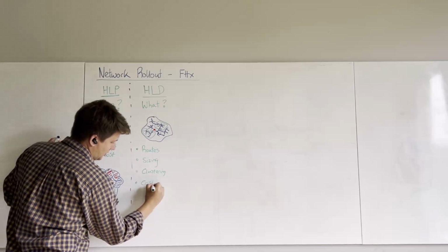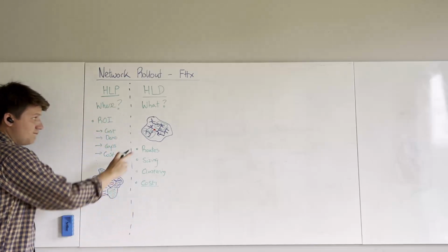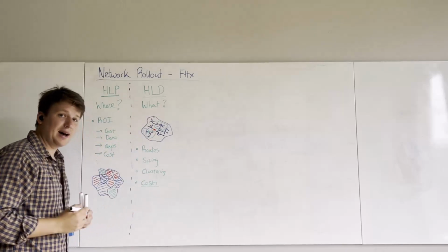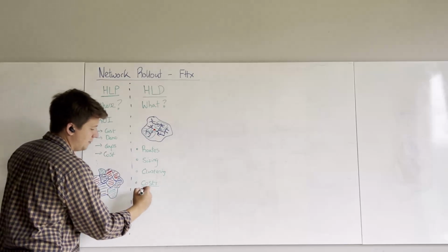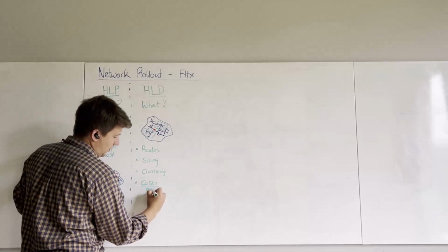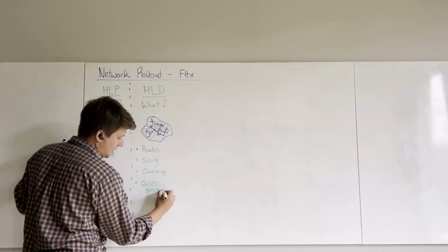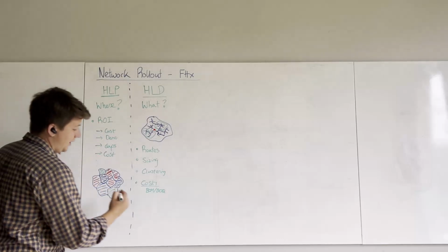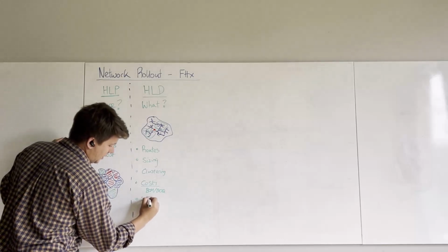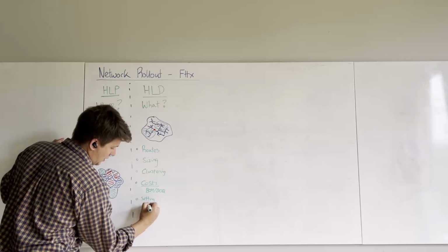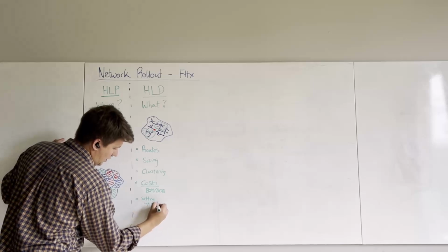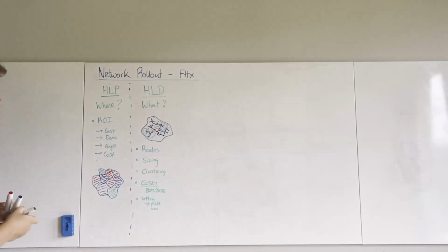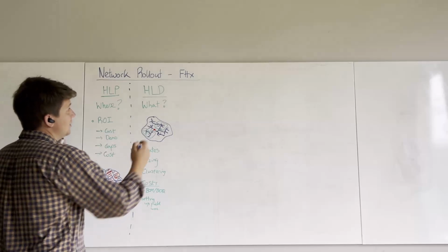One is costs. We thought we had a good idea of how much it's going to cost. Now we've gone through this process, we have a better idea of that. We might have a first bill of materials, or a bill of quantities at least, that we can look at. And the second thing that's really important in this phase is setting up field work. Because that's our next phase actually, and this is really important.